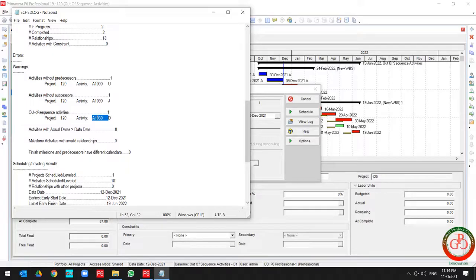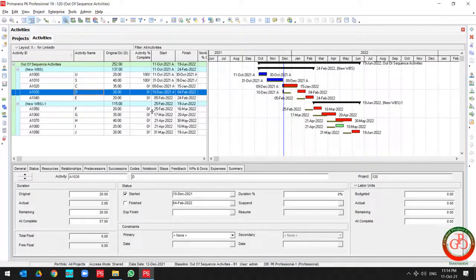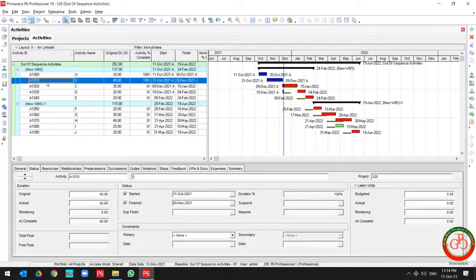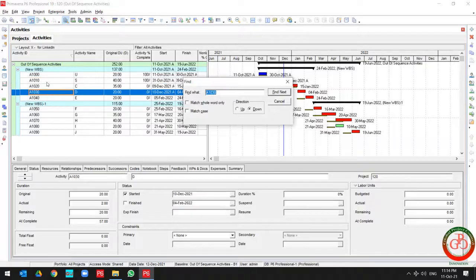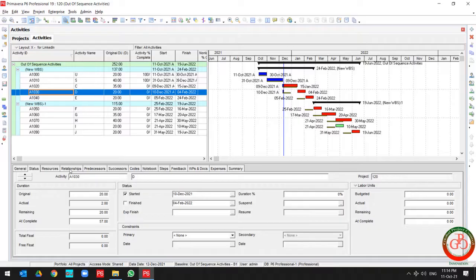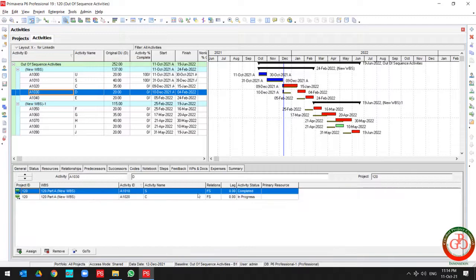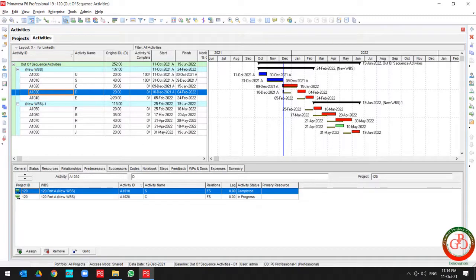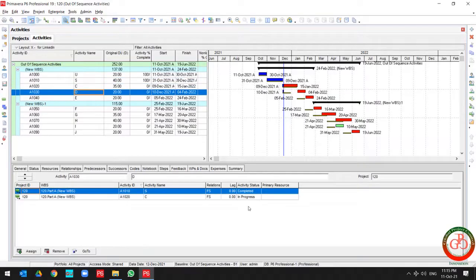This is the task ID. And if I'm looking at the task, then I can find that this task is out of sequence. Why is this task out of sequence? Because this task is connected to task S and also connected to task C by finish-to-start relationship.